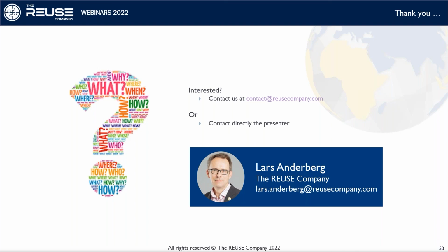It could also be so that if you have a complex requirement, you may want to verify on some sort of a component level in initial design, and you may want to verify in operation out there in the field later on to be sure that the requirement is fulfilled. So you may need to do more than one thing. And by doing more than one thing to verify a single requirement, you should also then assess that it has been completely verified as intended.